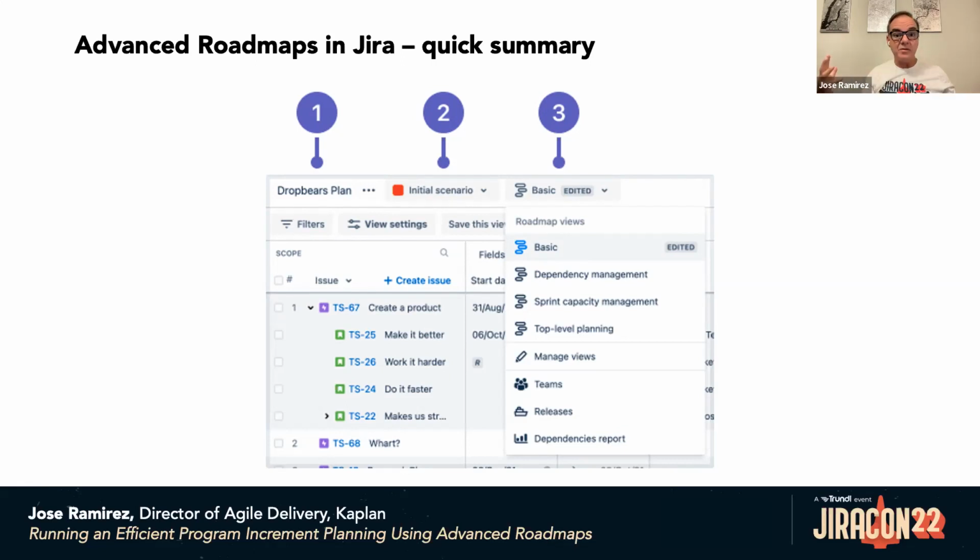But you can have several teams working on the same project, working on the same backlog. So how can we identify specific agile teams? Well, the answer to that is using the teams field. And here in Advanced Roadmaps, there's an interface to identify teams in a way that the teams are shared to all the organization. So everybody with access to Advanced Roadmaps can go to teams and see all the teams in the organization, or in the value stream if you are using Advanced Roadmaps by value stream.